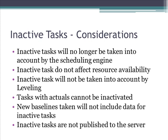If baselines are saved for the project with inactive tasks, some information for the inactive tasks will be retained. However, if you save new baselines, the data for inactive tasks will not be included. Finally, if you are in a project server environment, inactive tasks cannot be published.